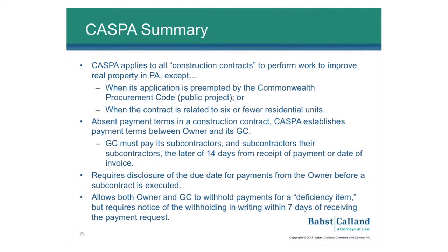This next point is one of the most often overlooked provisions, but is one of the most important provisions, frankly, particularly from the general contractor standpoint. CASPA requires the disclosure of the due dates for payments from the owner before a subcontract is executed.